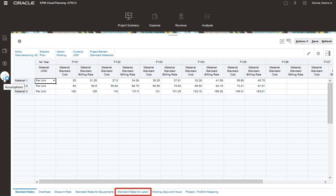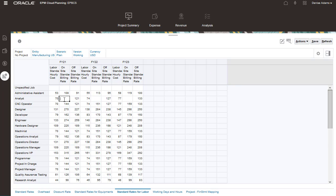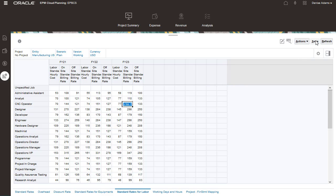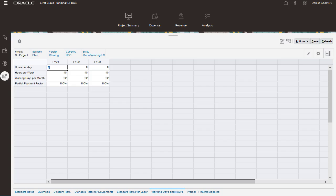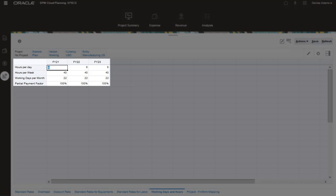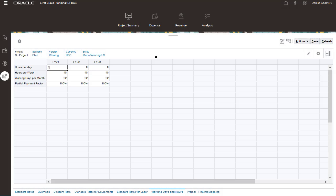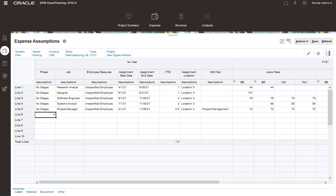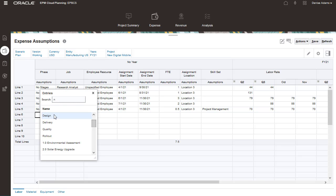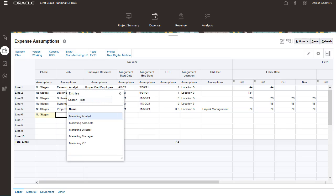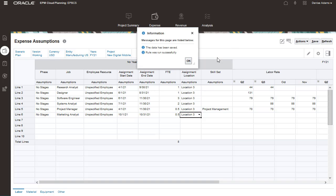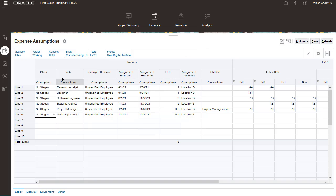We'll enter standard rates by job code. We enter a standard hourly cost that will be used to calculate labor expenses. Let's take a look at our assumptions for working days and hours. These assumptions will be used in labor-related expense calculations. We plan to calculate labor expenses using driver-based expense planning. With the remaining driver information entered, we can calculate expenses.